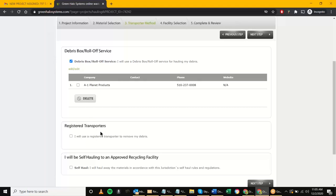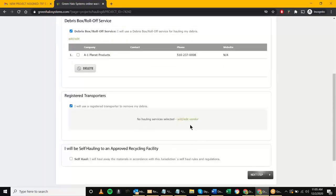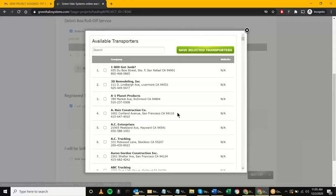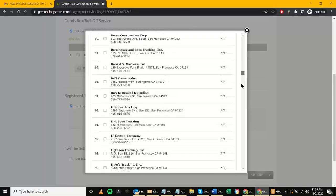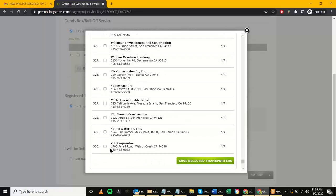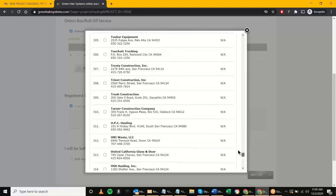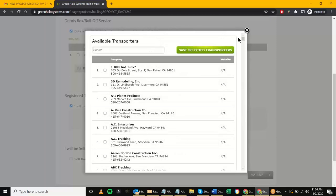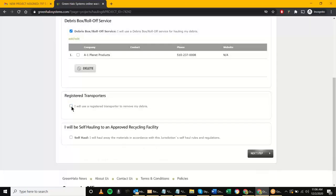The next option is the 'Registered Transporter.' Clicking 'Add/Edit Vendor' mirrors the other list, but this one has around 330 different vendors that can haul away the debris. Same thing applies — you can add a new one at the bottom and search. The difference between these two is that registered transporters just haul away, whereas debris box providers leave a dumpster on site for days, material gets thrown in, and then it gets hauled away.